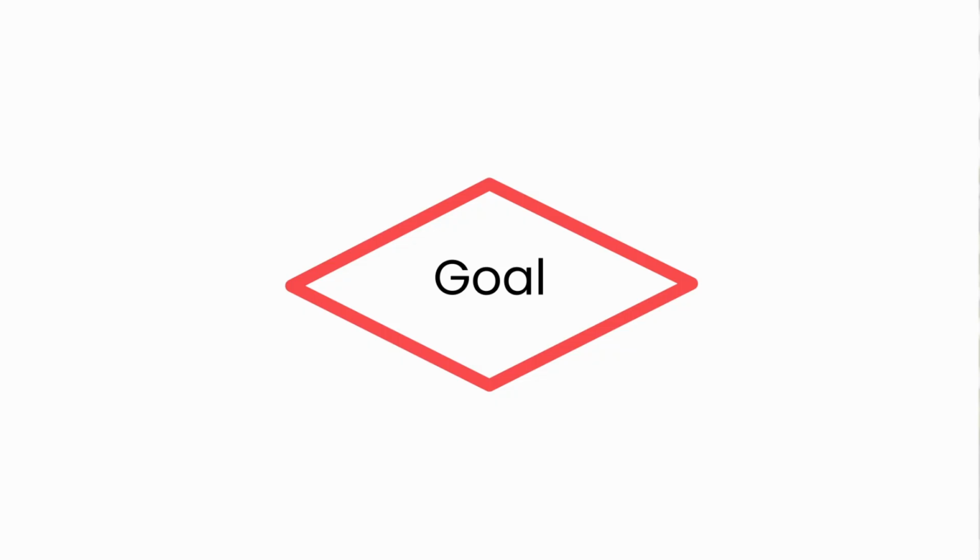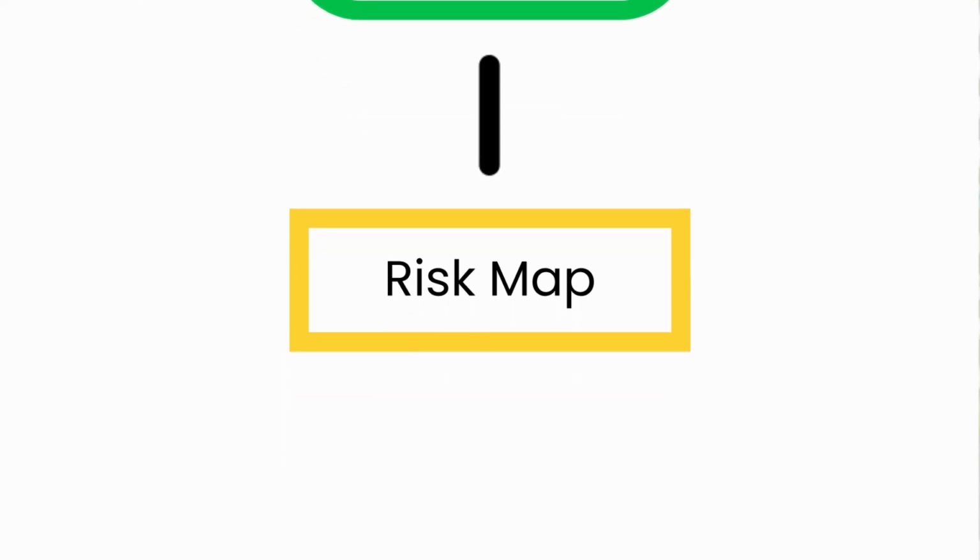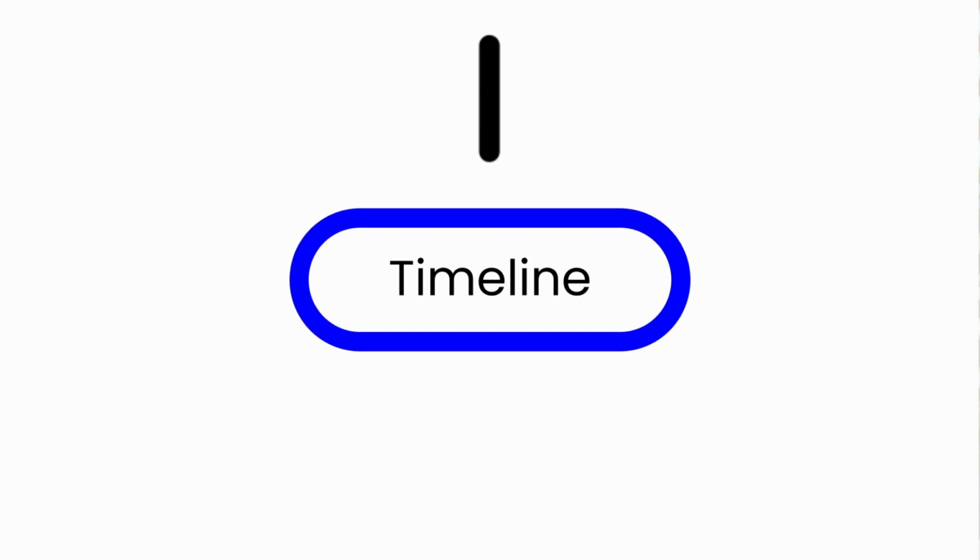Let's quickly visualize how this could work. So, as an example scenario, for a goal, let's say we could launch a four-city innovation hackathon series. So, as a first step, prompt Notion AI to create a 4-month plan for a hackathon series across London, Manchester, Birmingham, and Edinburgh, including venue booking, speaker outreach, marketing, and event delivery. Step two is to review AI suggested tasks, adjust based on the human judgment. The third step is to layer in a risk analysis using a predictive tool or a template. As a pro tip, AI gives you the first draft faster, but your leadership polishes the strategy.